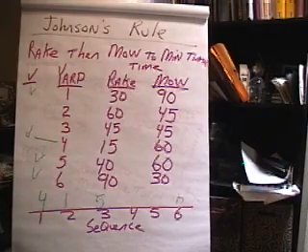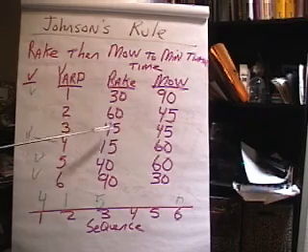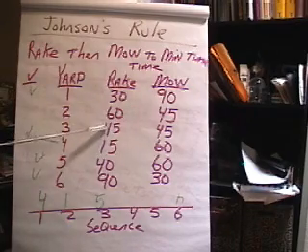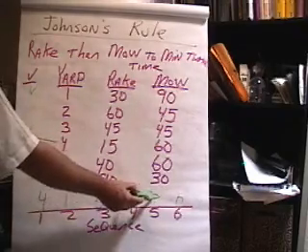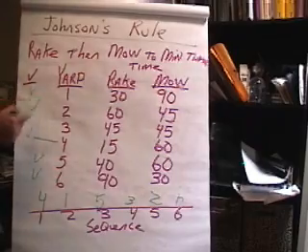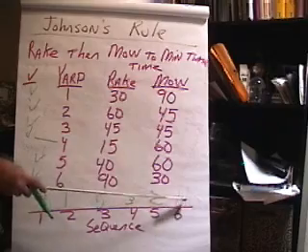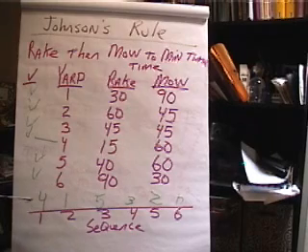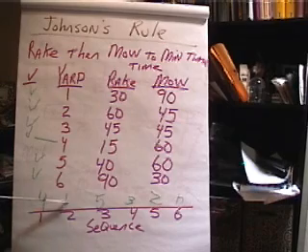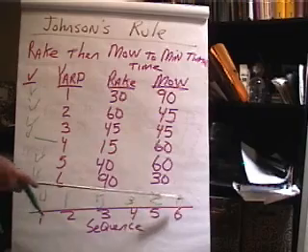Okay. And then we've got a bunch of ties. 45, 45, 45. So let's break the tie by looking at the 45 to 60. So 3 would be next, and then 2 after that. So again, if the lowest was on the second column, we put that at the end. If it was on the first column, we put it at the beginning. So the sequence of jobs: we first rake yard 4, then yard 1, then yard 5, then 3, then 2, and finally 6.